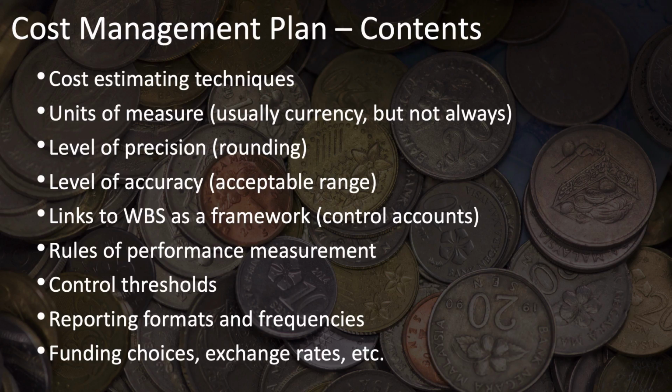It should also specify the units of measure. This is usually in terms of money, but not necessarily. It may be in other units, such as staff hours or days or weeks of time, measures that are based on time. It could be also based on other quantity measures, such as meters or kilometers or cubic yards or any other sort of measurement. But typically, it is in terms of money.